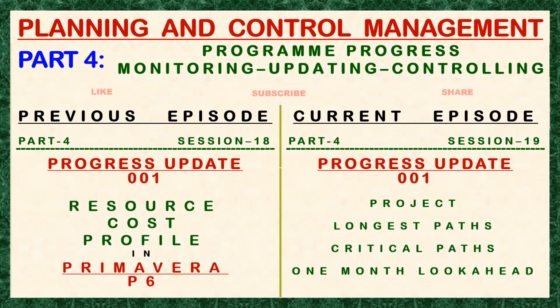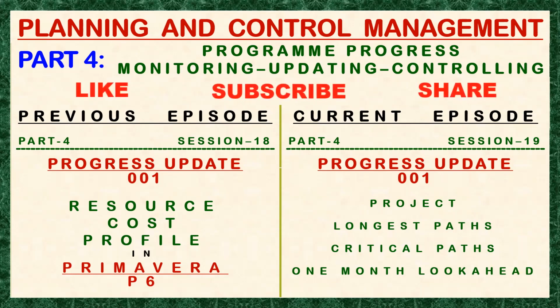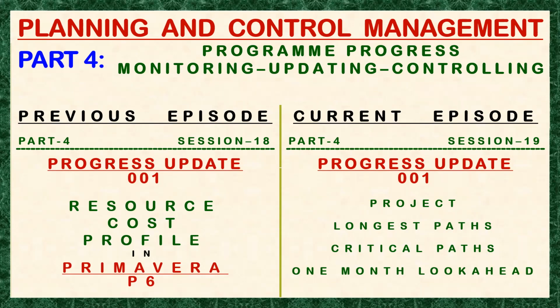While when we say current longest path, this can give us the information on what are those activities that drive the remaining longest network or path of activities that causes the project milestone to be behind the contractual schedule with the longest delay, where immediate attention must also be provided in the order of priority.